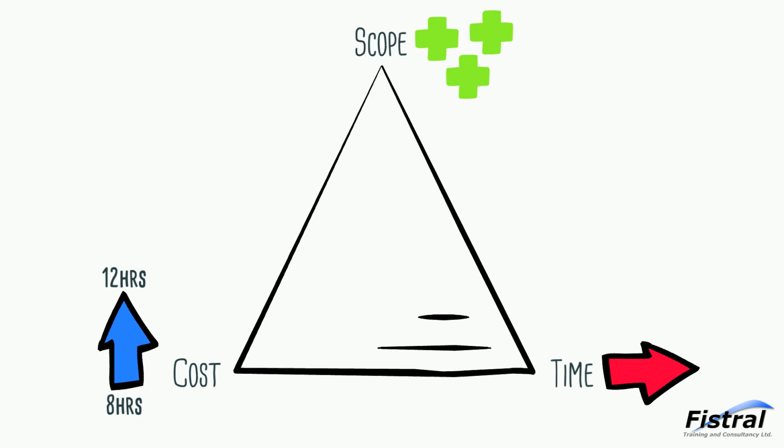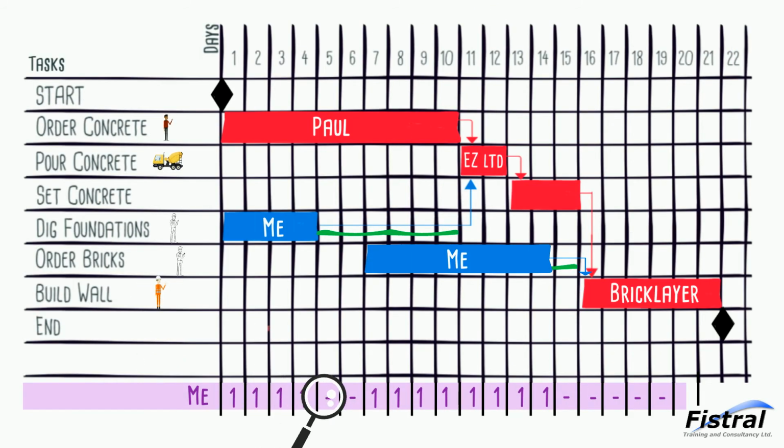If I need to calculate a budget, I can now do it fairly simply from my Gantt chart. How much are my resources working over the project? How much will that cost? What other resources are involved? Materials, equipment, travel, and so on. I add those together, and you've created a basic budget. As long as the data in my Gantt chart is correct, I can get out all sorts of useful information.